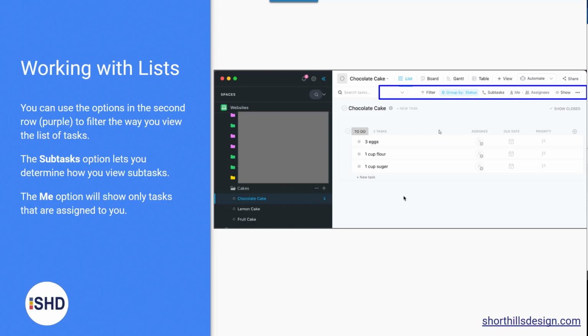One of the things that you're going to have to deal with in ClickUp is whether you want to use checklists or you want to use subtasks or a combination of the two. We did all subtasks, but it slows down ClickUp. Sorry, ClickUp support, it just does for us. Then we used checklists, but then certain things like, what if I send out the discovery form to the client, check it off, and then follow up with client in 7 days to make sure they haven't filled it out yet. You can't add a date to a checklist.